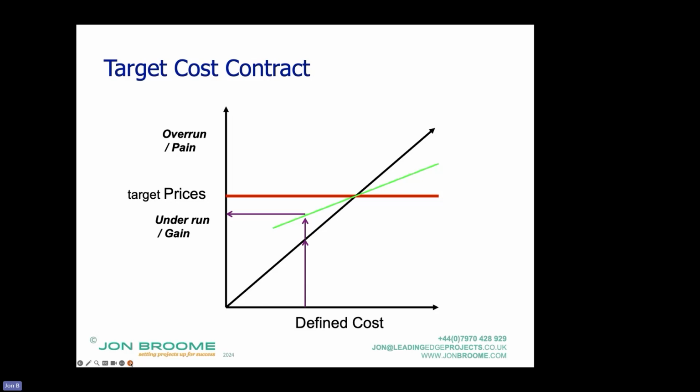But up to 10% is a good result. I think more than 10% of savings on the target price, you have to say, did we use it in the right circumstances? Did we get the pricing right? All right. So if it was built up on an open book basis, we went wrong somewhere probably. Yeah. But you also have to, going back from that, ask did we use it in the right circumstances? Should we have used the cost reimbursable contract?